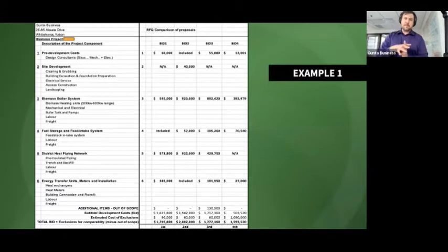So a lot of them group stuff up. A lot of them exclude things completely. Some of them include things that you never asked for. So we go through this. And as you can see in this RFQ comparison of proposals, we chart out those who did put their number. And then at some points we show that it's actually included elsewhere, or it's not included at all. And so we go through this process of determining those who added additional items that were out of scope, we need to identify the value of that and then remove it from the bid comparison.